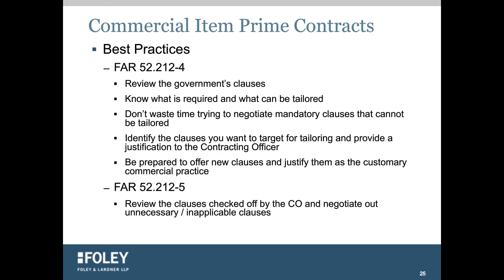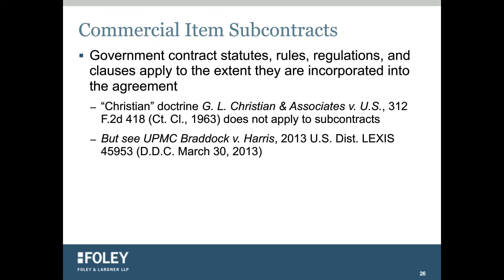What about commercial item subcontracts? So subcontracts are a hybrid between a government contract and a commercial contract. Government contract rules, statutes, and clauses apply to the extent they're actually in your contract. So I love it when I'm negotiating on behalf of a subcontractor and the prime says, well, don't worry about all those 100 clauses that won't apply to you. They're self-deleting. Guess what? They're not self-deleting. If they're in your subcontract, they apply to you.